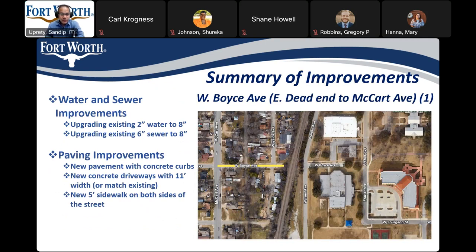West Boise Avenue from McCart Avenue to East Dead End is a bond-funded street and will have the following improvements. The water and sewer improvements include upgrading the existing 2-inch water line to 18-inch and upgrading the existing 6-inch sewer line to 18-inch. The paving improvements include new pavement with concrete curbs, replacing concrete driveways with 11-foot width or match existing, and new sidewalks on both sides of the street.